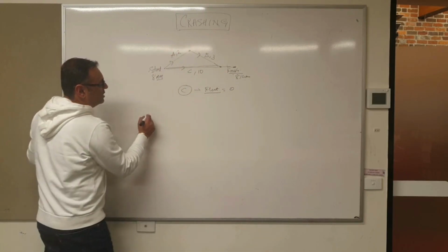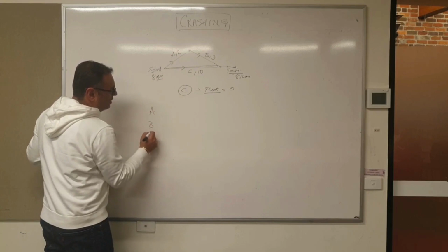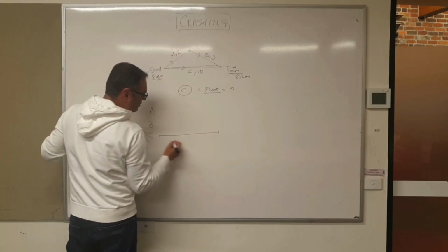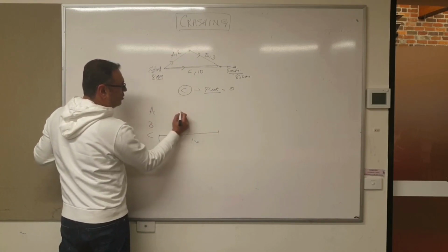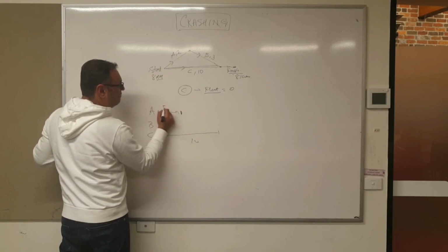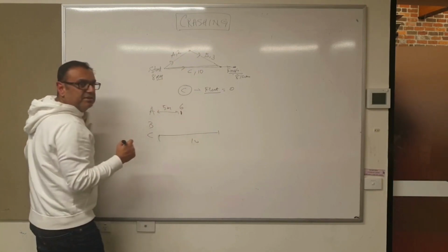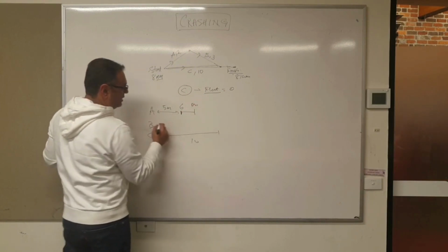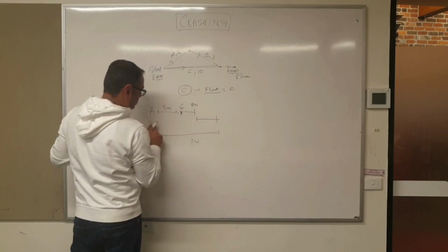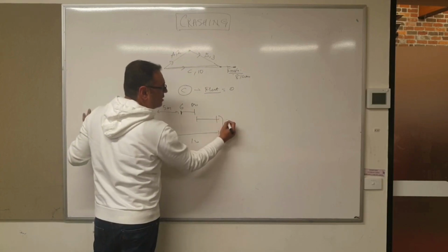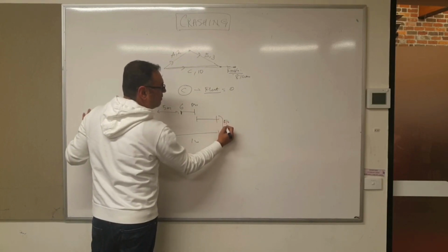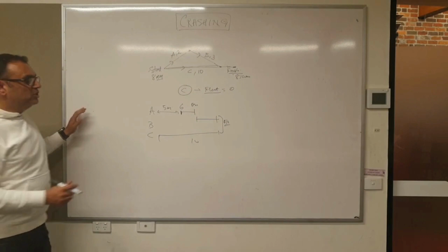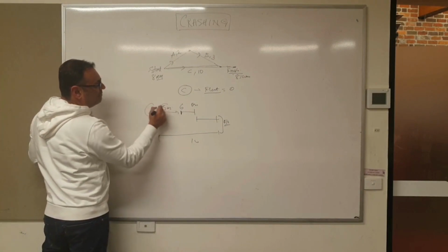So what I'm doing is A, B, C. C takes 10 minutes. You can delay A by 5 minutes, and on the 6th minute, you start A until the 8th minute. And then 8, 9, 10, you start B, and you're still out by 8:10. So you can delay A by 5 minutes.